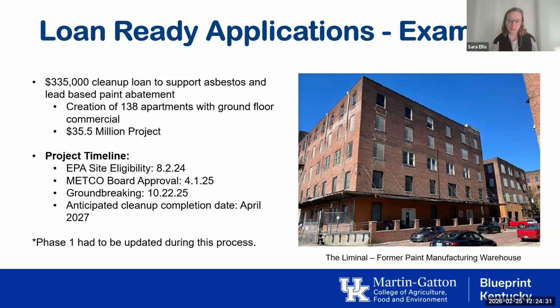So I think it's also important to think about with these projects that your cleanup timeline is often going to be a couple years before the project is cash flowing, if you will. So before it's making any money, there's a lot of prep work. And it's something to keep in mind when you're thinking about how am I going to finance this, that it does require enough funding to keep things moving until you're actually seeing dollars coming back in the door from whatever the end use is.